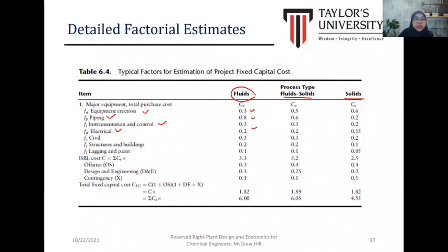Okay, the total ISBL, inside battery limit cost, denoted by C, can be obtained by multiplying the factor by the equipment cost, and then we can also consider the outside design, engineering and contingency based on this factor.